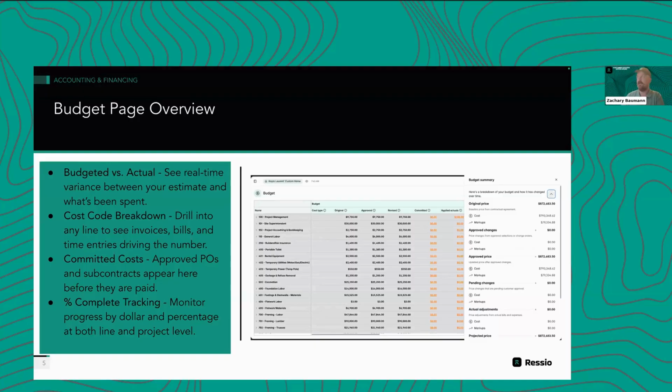Are we doing okay? And then tied to that, we also have the completion status column that a lot of builders have questions about. Essentially, completion status allows you to determine where your projected is coming from. So your projected by default is going to be the highest of your revised, committed, or actuals columns for that cost code, essentially saying the highest of these three, because we presume that whatever the highest dollar value is, we want to make that the assumption unless told otherwise.